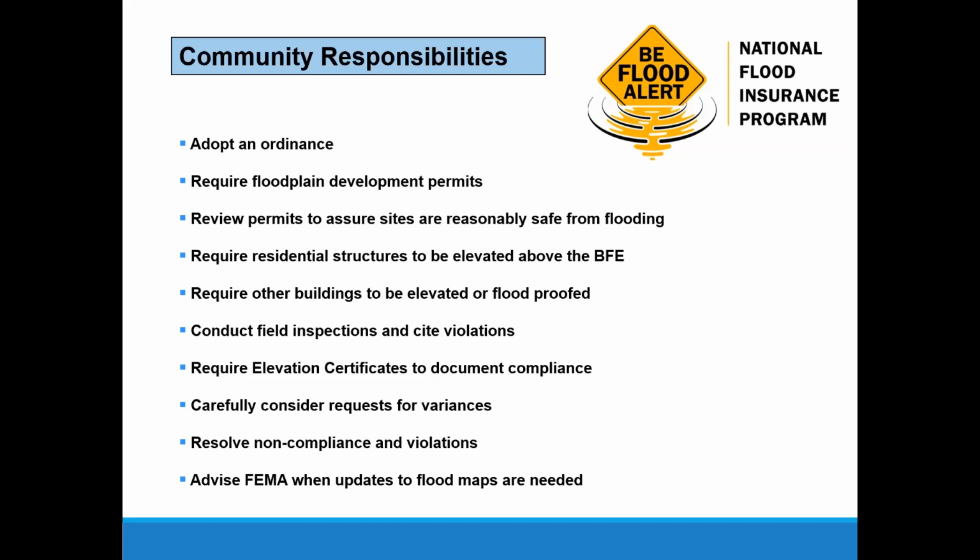And then we have to have finished elevation certificates to document that compliance and then review that certificate to make sure it is actually compliant. And so that is written into all of the ordinances that you have finished elevation certificates. Some communities require an under construction certificate as well, to make sure that you're at least starting off with building plans that are compliant, so that you're working with them through the entire process to make sure that you're not just kind of blindsided at the end of the project.